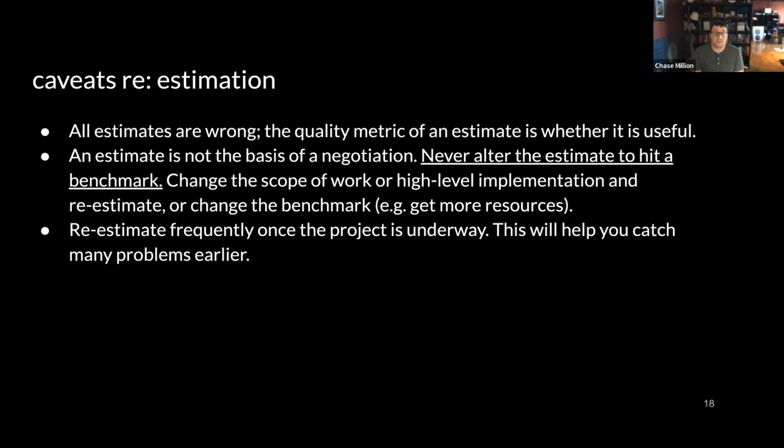allow you the opportunity to change things in the project so that you can still get within the estimate cap. So you might have to change your technical approach. You might have to request more money. You might have to change the final deliverable. But you will never know those things unless you go through this whole exercise again mid-project.